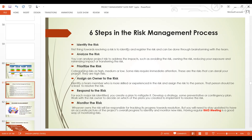The next step is to prioritize the risk by categorizing it as high, medium, or low. High risks can derail your project. Medium risks can affect it but not derail it. Low risks cannot affect the project significantly. You must prioritize risks to know how to handle them. Some high risks may need to be avoided; if they can't be avoided, you might transfer them through insurance policies.